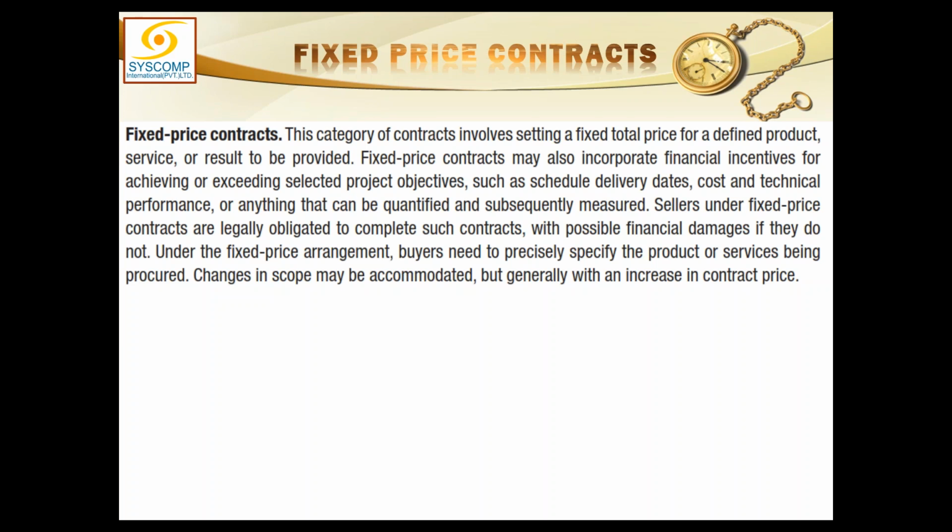And there we studied, out of various types of contracts, the firm fixed price contract is the one which is safest for the buyer, least riskiest for the buyer, and most riskiest for the seller. So as a buyer, I would like to take almost no risk. So firm fixed price is a very good contract for me. And in that, my contractor will carry all the risk. Naturally, I am paying him for that, but my contractor should carry all the risk.